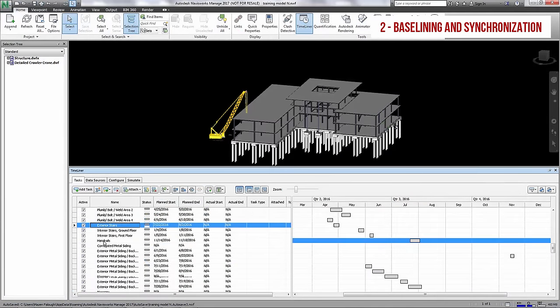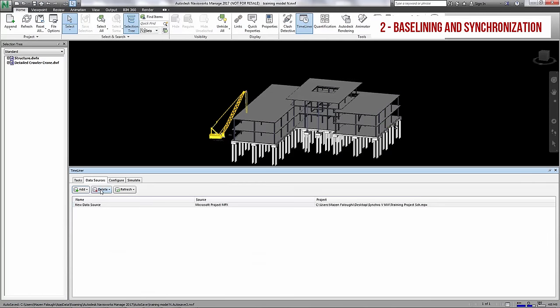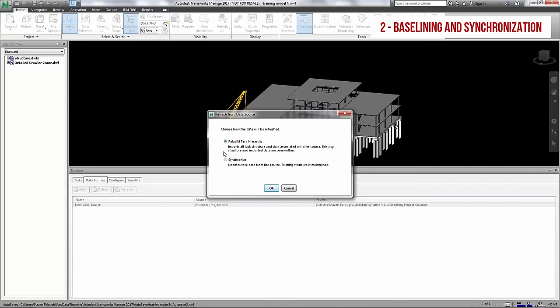However, you can't really save baselines in Timeliner, and synchronizing a schedule provides less control to the 4D user and will not retain any activities or parameters added by the user.